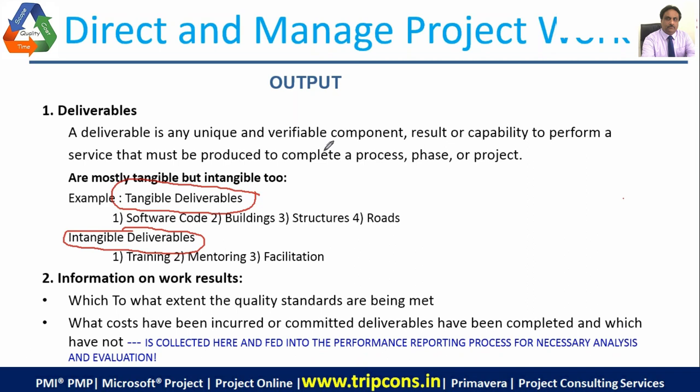Suppose you made a software system. Do you think that the software system delivered to the client without any kind of end user training would be much useful? Do you think a software would be useful without training? Suppose you constructed a building for a client and you hand over the building without any diagram or layout of electrical, plumbing, sanitation. Do you think the client would be able to maintain or manage the building without these diagrams or layout? Will it be possible? No. So what you are giving along with the main deliverable is called the intangible deliverable.